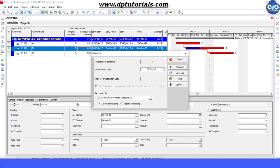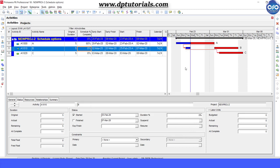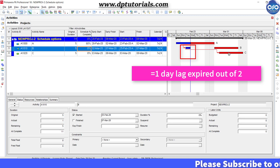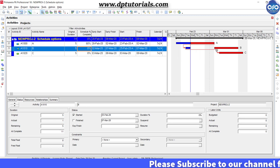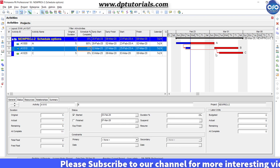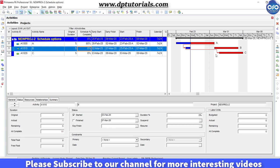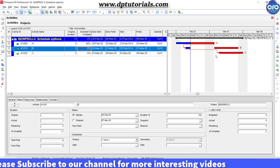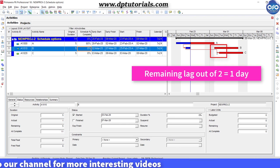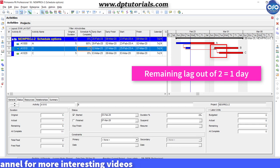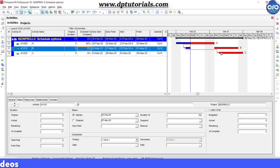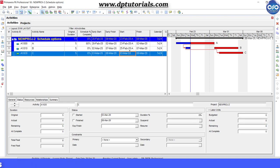As activity B has started and one day has been passed away, we can say that the lag of one day has been expired already. And activity C can now only start with the remaining lag of one day because original lag is two days and minus one has been expired. So remaining lag is one day. So activity C can start on Tuesday that is 3rd March 2020.